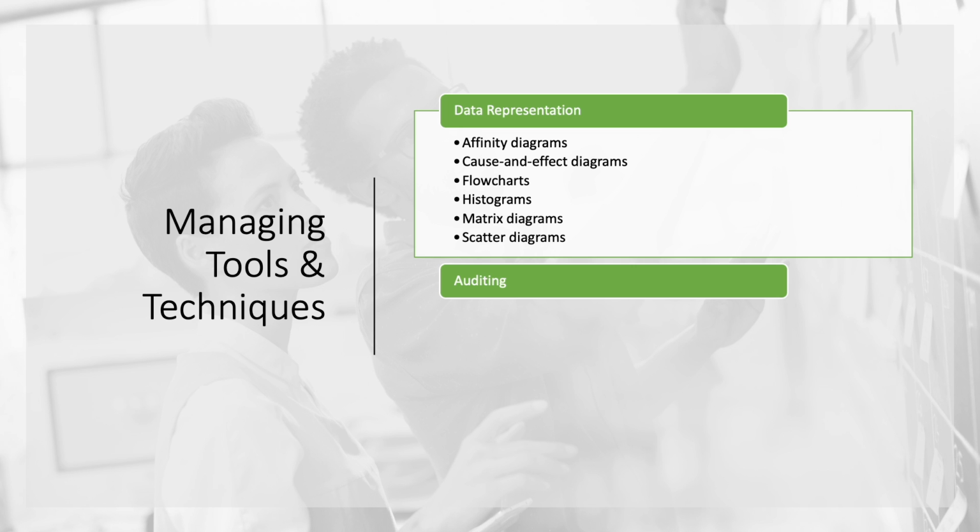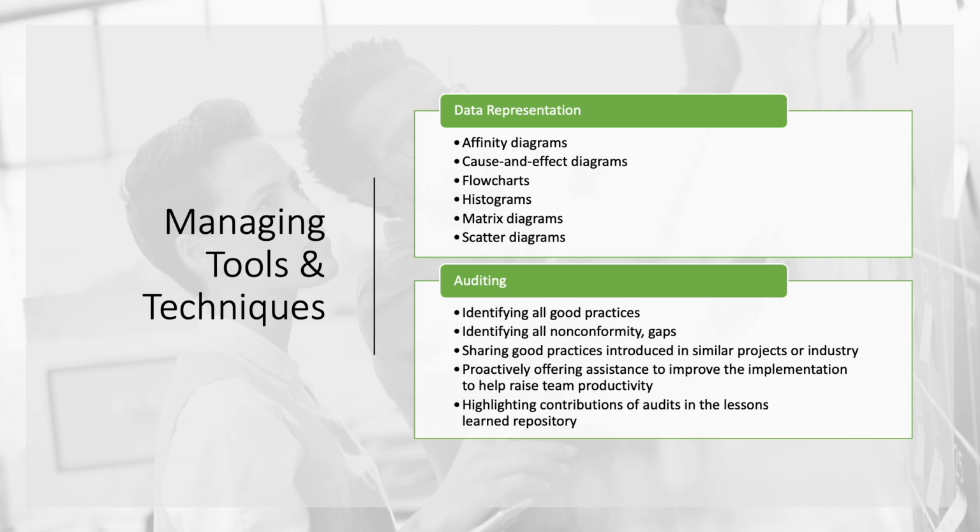Auditing is a process in the business which is used to determine if the project aligns with the organizational and project policies, processes, and procedures. Identifying all good and best practices being implemented. Identifying all non-conformity gaps and shortcomings. Sharing good practices introduced or implemented in similar projects in the organization and/or industry. Proactively helping in a positive manner to improve the implementation of processes to help raise team productivity and highlighting contribution of each audit in the lessons learned repository of the organization.